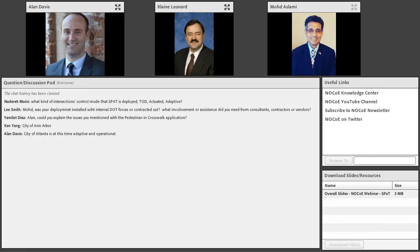Well, I think there were a couple of things for us, and we started this about 4 years ago. Alan mentioned interoperability. That was probably our biggest surprise. We had 4 different vendors of DSRC equipment and 2 different signal controller vendors, and we just assumed going in that all of these would talk to each other and that things were more mature than they were, and they weren't. And we put a lot of work into making those things happen. Every vendor of DSRC equipment dealt with little tiny issues in different ways. I think luckily a lot has happened, particularly in the last year or so, to get over that problem.